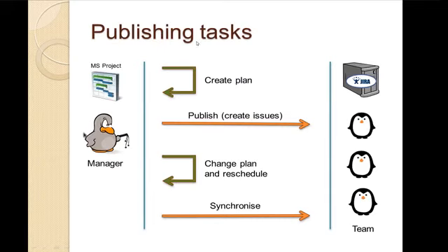So let's take a look at some basic operations we can automate with the bridge. Publishing tasks. Publishing tasks means creating issues in JIRA based on Microsoft Project tasks. So, for instance, the manager creates a project plan in Microsoft Project. Here, it is created, and then he or she publishes the plan in JIRA.